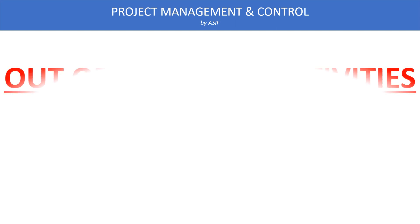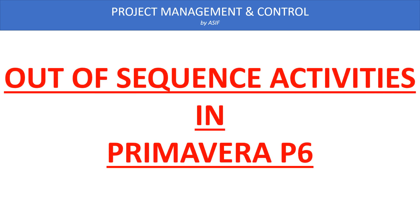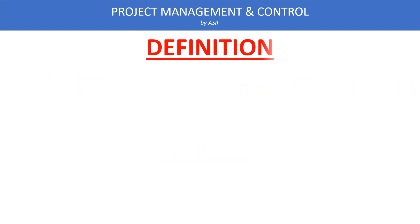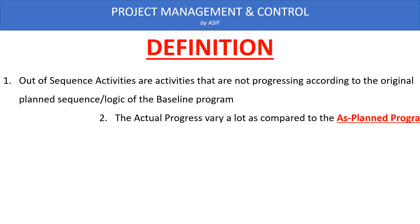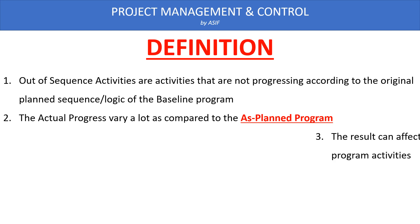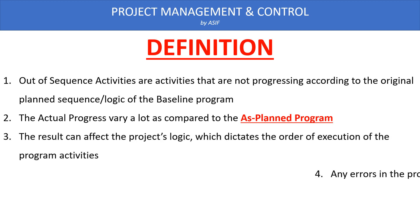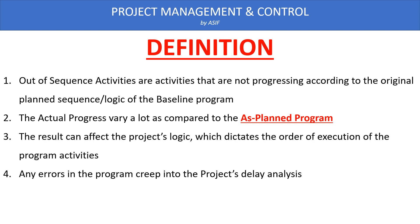This video is about auto-sequence activities in Primavera P6 software. Auto-sequence activities are those activities which are progressing irregularly or not as per the baseline plan. Activities that are not progressing as per the original plan and logic are called auto-sequence activities. Our actual progress varies a lot compared to the as-planned program, which affects the logic of future activities, network calculation, and project delay analysis.